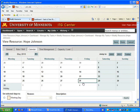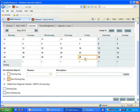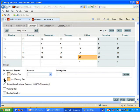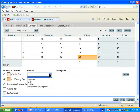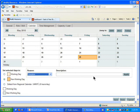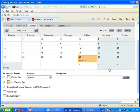If I want to add items for planning purposes — for example, I know that I'm going to be out Friday the 28th and we're working on planning for that week — I can click on that date and go over to Set Selected Days and check the radio button next to Non Working Day. It highlights the date, and then I can go over to Reason and give it a reason. So I'm going to select Vacation, and in order to add that to the calendar, I just click Apply. So now Vacation is added to May 28th.